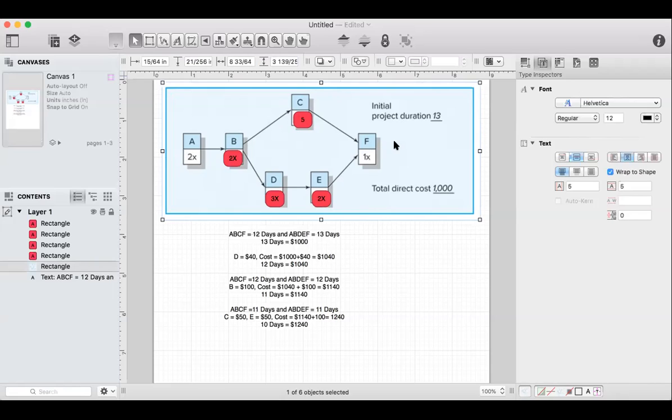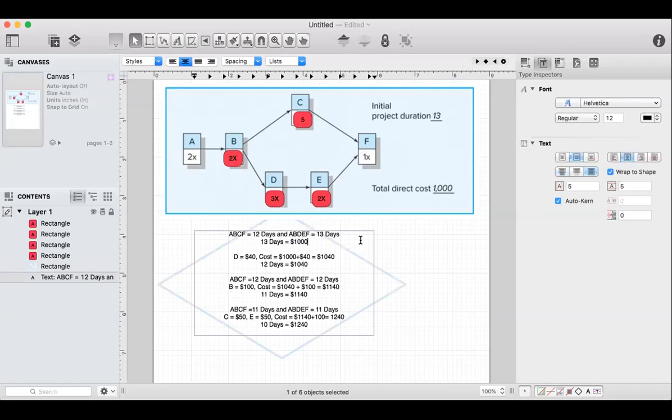You guys understand? So it depends on the cost as well. 100%. And you notice that in both of those exercises, I only give you direct costs. I haven't given you indirect costs. But sometimes I give you indirect. So same as I give you direct costs here, I might be giving you indirect costs of, let's say, 13 days. You might say 200 indirect costs for 12 days. You might have 100. So you start adding the totals together to be able to decide which duration is the best duration for me to crash the project.